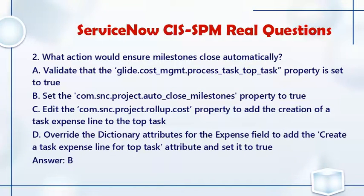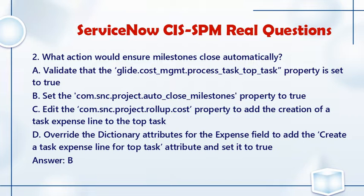Question 2: What action would ensure milestones close automatically? a. Validate that the glide.cost_management.process_task_top_task property is set to true. b. Set the com.snc.project.auto_close_milestones property to true. c. Edit the com.snc.project.rollup_cost property to add the creation of a task expense line to the top task. d. Override the dictionary attributes for the expense field to add the 'create a task expense line for top task' attribute and set it to true. Answer: B.